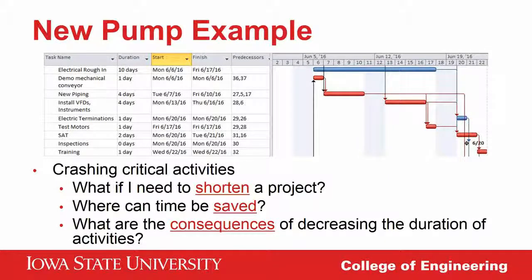This work is electrical and mechanical in nature. Those types of contractors have multipliers that are pretty effective in modifying costs for weekend or overtime work. They even adjust for productivity losses of each worker when days are more than 10 hours long. So I can move demolition from June 6 to June 4, and the same for activities the following weekend. At this point, I've started production 4 days early and increased my costs around $20,000 for the weekend work. This increased cost is still less than the profit I expect to earn, so I can keep cutting.